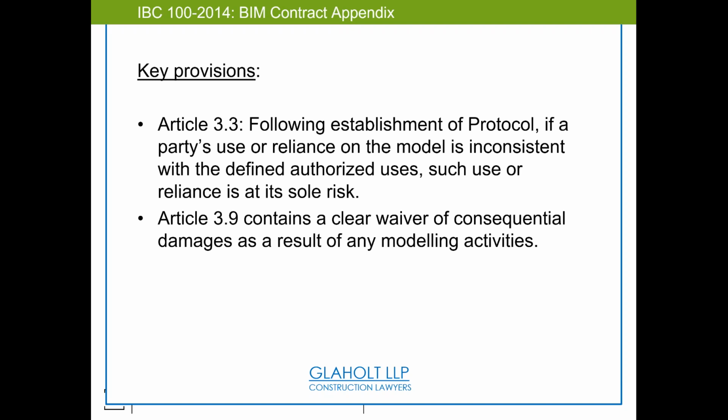If after the protocol, they want to use the model for something else, you're at risk. Example there, and I've seen this a lot: we're only using the model for design authoring, design review, and visualization. Somebody else wants to use it for schedule simulation. Use it. You're at risk.